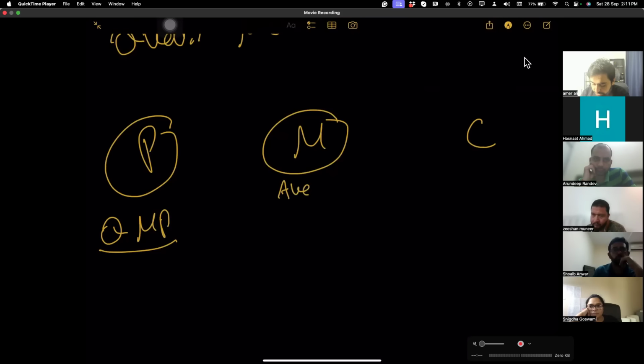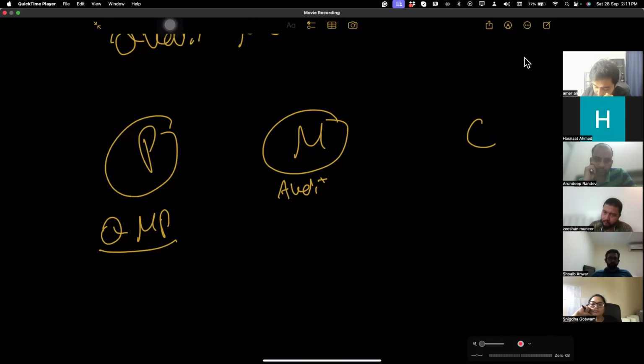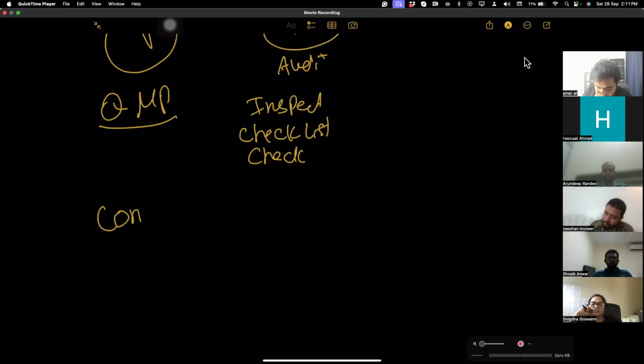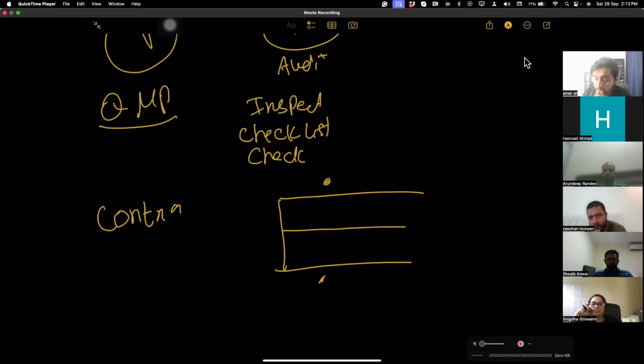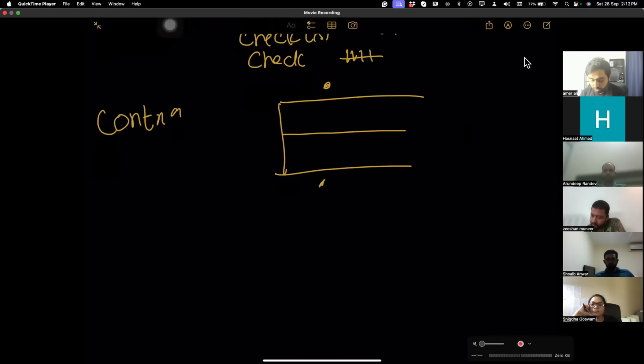Once you make the quality management plan and it is approved, throughout the journey you do an audit of the process to make sure you are doing quality assurance right. Quality assurance is while the deliverable is being done, like the cost of conformance you are putting in. Things are done using a checklist, a list of things you check, or check sheets, whether it is present or not. You use a control chart, which says whether the process is within control or outside control. You use check sheets: yes, no, count the defects. Checklist: tick, cross. Check sheet is counting. Control chart: is the process in control or not?